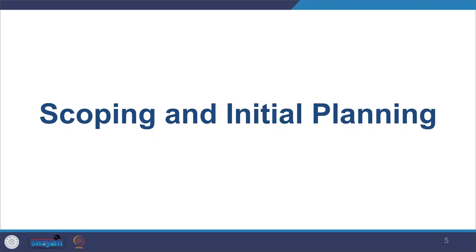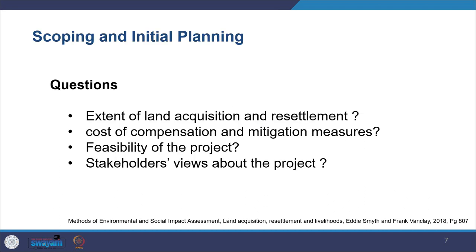So moving on to scoping and initial planning, we see that whenever you're doing this, you need to ask key questions like to what extent the land will be acquired, what will be your scale of land acquisition, and how many people will be resettled, where you will resettle them, what will be the quantum of resettlement which will take place because of your project. So in the scoping stage, you need to have that kind of understanding.